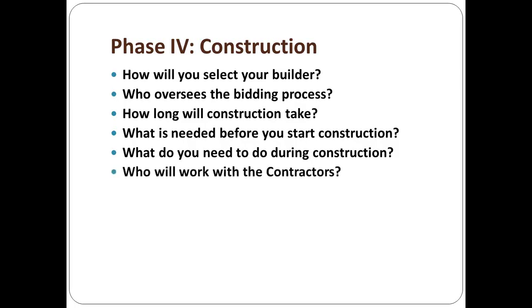It's very unlikely that you're just going to be able to walk away from the project during the 8 to 18 months that it's coming out of the ground. You're going to have to assign one person who's a spokesman and contact person for your church with the industry professionals and work through whatever they need to make it happen. They're going to need your support because you're the owner. It's your project. You have to make decisions as you come along.